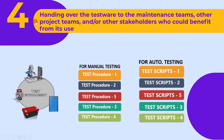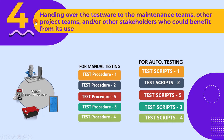The fourth activity is handing over the testware to the maintenance teams, other project teams, and other stakeholders who could benefit from its use. If this is the final release to the customer, then all the created testwares are shared with the maintenance team. Based on the customer's requirements, if any changes are required, the maintenance team can use the testware to address the request.